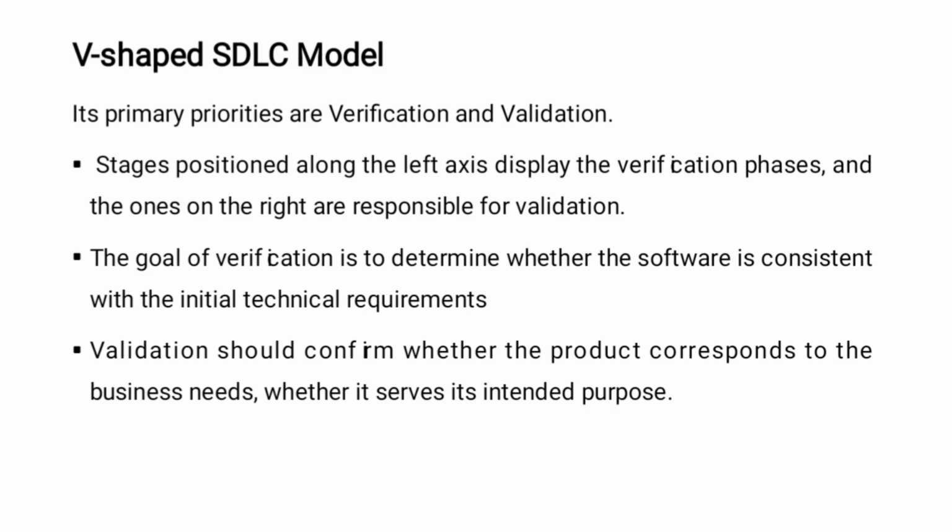Next one is the V-shaped software development lifecycle model. Primary priorities are verification and validation. Stages positioned along the left axis display the verification phase, and the ones on the right are responsible for validation. The goal of verification is to determine whether the software is consistent with the initial technical requirements. Validation should confirm whether the product corresponds to the business needs, whether it serves its intended purpose.